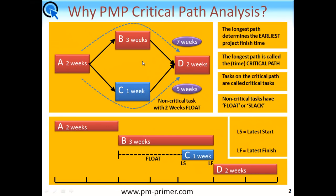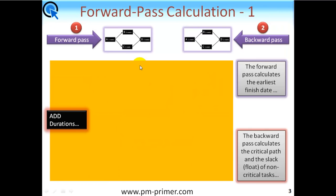For a typical project we need a recipe for success. What you actually do is two calculations: one, a forward pass — starting at the left-hand side and moving left to right, calculating as you go — and then a backward pass, coming backwards and calculating backwards. When you perform the forward pass, you get the earliest finish date for your project. When you do the backward pass, this calculates the critical path and the slack or float of the non-critical tasks. The first thing to understand before doing the forward pass is that we add the durations. There are two simple rules going forward and two simple rules going backward.